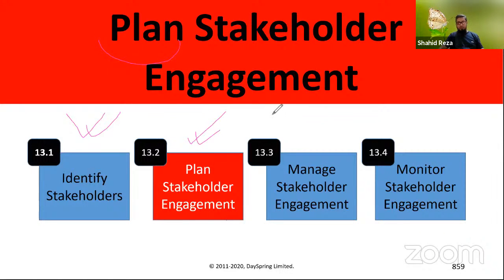All right. So if we remember what we did in the stakeholder register, there are two categories of information. First is contact type information, and second is the expectations, requirements, power, and influence. And the last column was category. Is this an internal stakeholder or an external stakeholder?